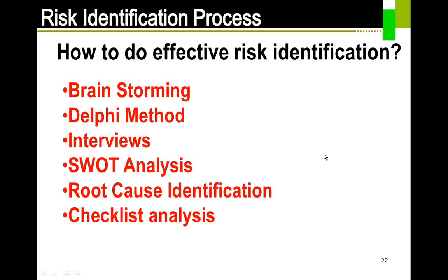Third thing you can do is interviews. What it means is you would speak to the people directly, face to face, and give the scenario: this is the project that I am doing, I would like your inputs on what might go wrong. Then SWOT analysis, which I touched on a little earlier. You take any scenario and understand the strengths, weaknesses, opportunities, and threats from that particular activity or project.